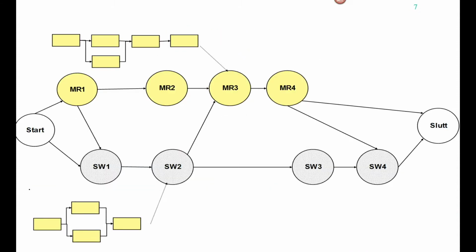And this is an example of a more advanced milestone plan with 2 deliverable runs, as it's called, and we have a marketing series of milestones here. We have a software development series of milestones here. This is a rather advanced plan. Actually, we have dependency between the 2 milestone sections, almost like sub-projects.